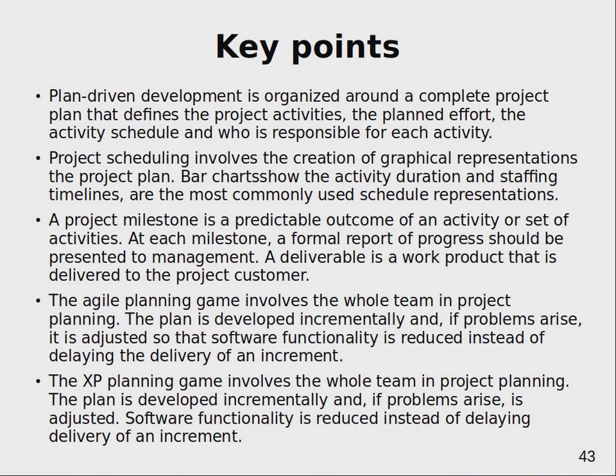And there are two different kinds of milestones. Milestones where you just review your progress against your plan. Usually you do not have internal milestones for an iterative approach like Scrum sprints. You have a milestone at the end, but not internally inside this particular sprint. But if it has longer time, you definitely should have, when you need to check what has been done so far.